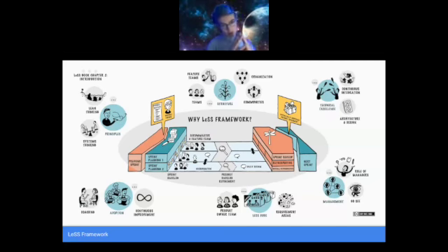And then there's an overall retrospective period where everyone comes together and discusses how the whole process can be improved as one huge team. And then we start the next sprint and go at it again. Some important things to note is that there's one product backlog. While there's many teams, there's only one product owner and one product backlog, which is a key difference here from Scrum of Scrums or Scrum Scaled Up and LeSS.